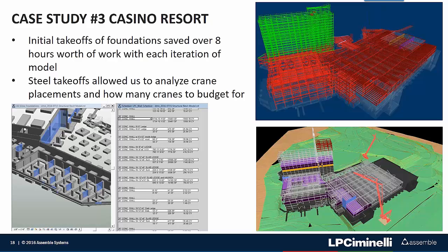We could also determine if we needed to rent a crane for a week to move some pieces or if it would just be a day pick. This helped us to refine our budgets and refine our estimate, understanding that we might not need 2 tower cranes or we might not need a secondary crane for 3 weeks.